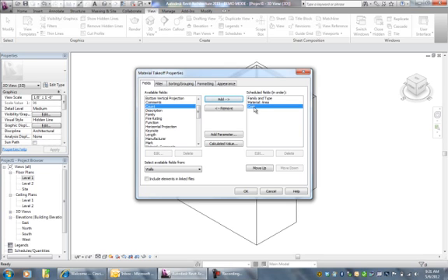So what would be the formula, do you think, if I was going to develop a cost for a wall right now? Length times unit cost? Well, this unit cost, we're calling that cost. And why length times height? Well, how about area? So, how about material area times cost?